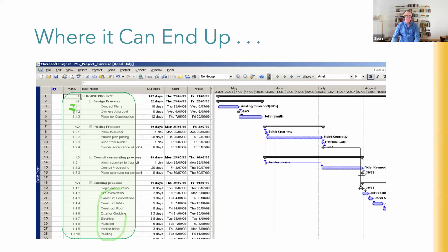And we've got our numbering system there, which is one of the automatic numberings you can switch on, one of the columns you can add in to Microsoft Project. So that's actually where it ends up there. So that's a great use of the work breakdown structure too. It's not just an abstract concept. And obviously if it's here too, it can map straight back to your cost accounting system. And you can also, under the view command here, go show me the work breakdown structure, and this will turn around and show you all of that as a work breakdown structure.